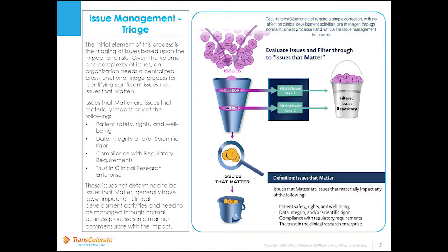That's not saying that they won't be. If the same quick fix keeps occurring, it should be elevated up as an issue flowing into the funnel. When an issue first occurs, the first step is triage. Triage positions organisations to effectively focus on addressing issues that matter by applying the necessary resources, funding, skills, etc. to bring about appropriate resolution.